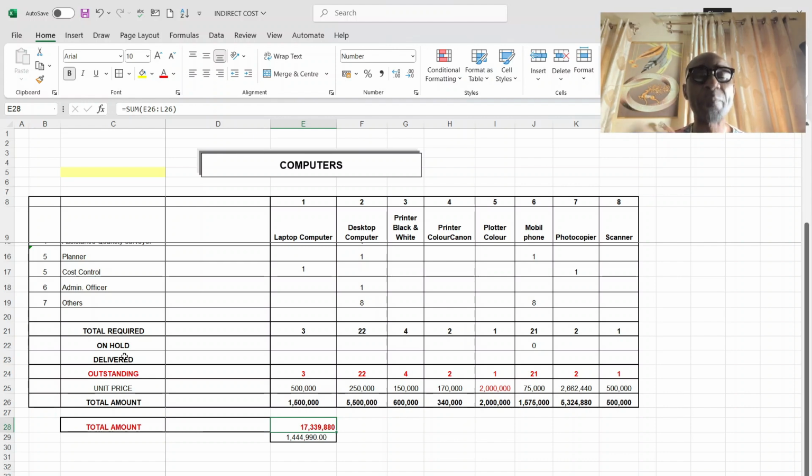But for a proper understanding of how to price preliminary, that's why I am going to the extreme. I don't know if you understand what I mean by these items can be rented at a very cheaper price and after the project returned back, meaning you're not going to buy it outrightly. If you are renting it, the costs in the end will not be up to 17 million.